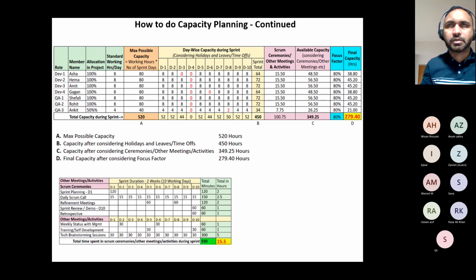Because some of the team members or some of the other teams might not be in agreement with 8 points. "Oh, to us, 8 points is less, because we already estimated higher." Okay, how about 13? Get it somehow to start as a baseline, and then go from there. Once you start your journey, you look back at the data, and then you can change your numbers, average velocity and commitments. Does this make sense?